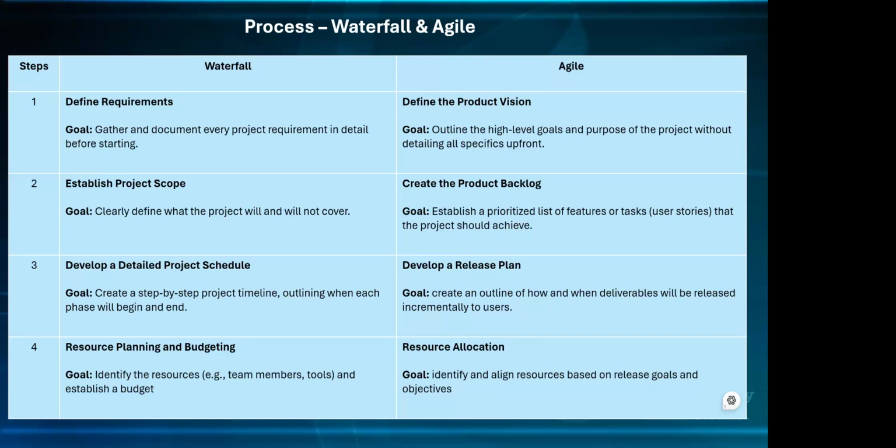And your product backlog, we know, is the prioritized list. Most times we just list things in the product backlog. There is another meeting that we have, which is the refinement meeting, where you refine things. That's when you prioritize that, okay, based on what we've gathered, for us to do this has to come first, that has to come first. And that backlog is now refined. But initially, once the requirements are gathered, you just create the backlog, with all the requirements you need to achieve that product or project listed in it.